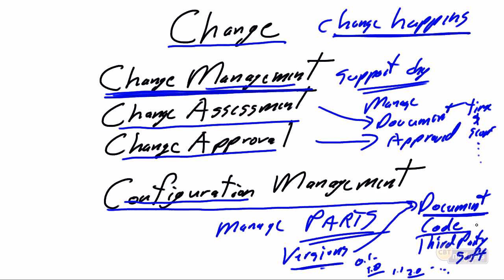We need to have a configuration management tool, a software versioning tool, so that, again, we can properly manage the code so that we always know what the current tested release of code is going to be, so that when we're doing builds, we're not getting into versioning challenges. Oh, we just built with the wrong version of the customer maintenance module. So we need to have effective configuration management in place for our code, and we need to have effective configuration management in place for any other pieces of software, any other components that our project is going to use.